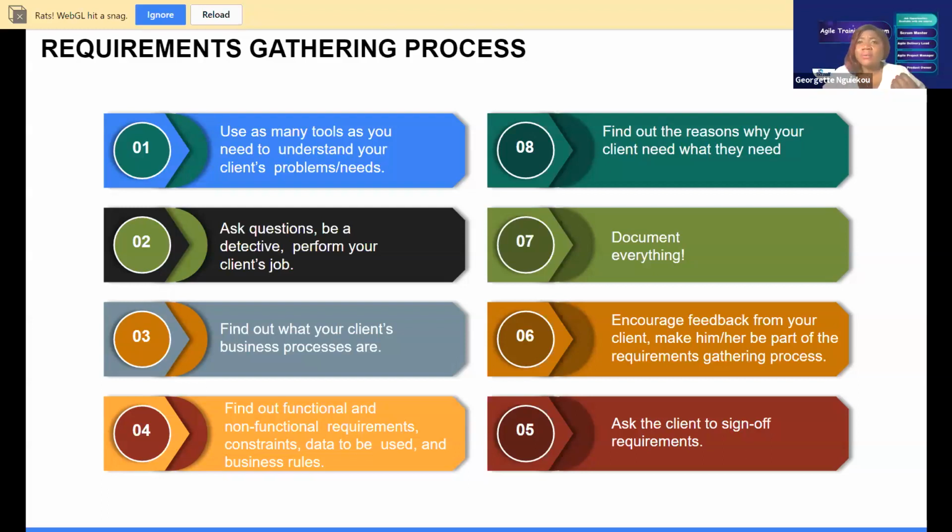You cannot see, you cannot touch, but it's a big deal. If you have to click on the button, it takes you forever. That means the speed is a problem. And if the speed is a problem, you want to make sure that your website can accommodate a speed, for instance. So those are what we call non-functional requirements. You have to capture them and you have to put them in the backlog as well.